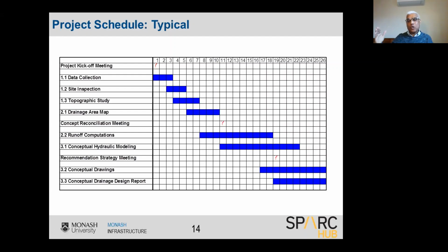Do the progress control on a monthly basis. I know that you might say that research projects are big projects, so you don't have activities on a monthly basis. I'm not aware of that. Try to do a sort of a sub-basis, for example, your data collection process, your literature survey. You might have a local literature survey, a foreign literature survey, data collection, lab work. Put those activities in. Prepare a simple chart and monitor it.